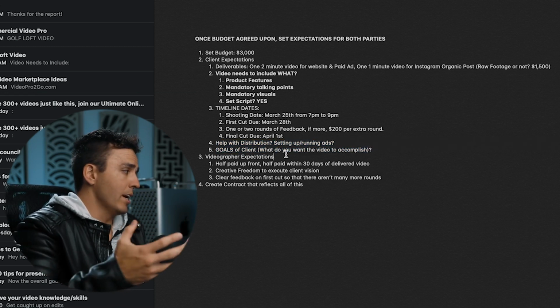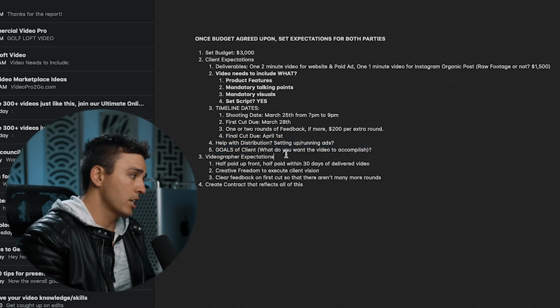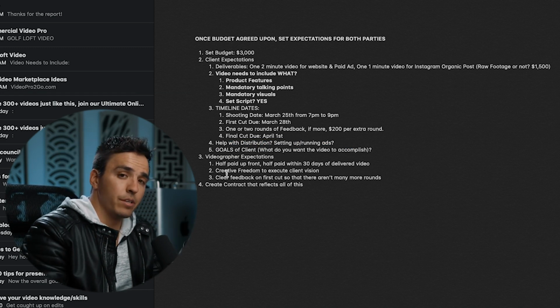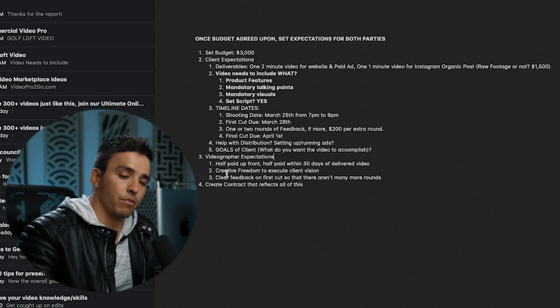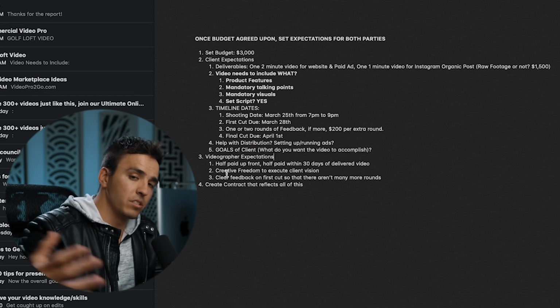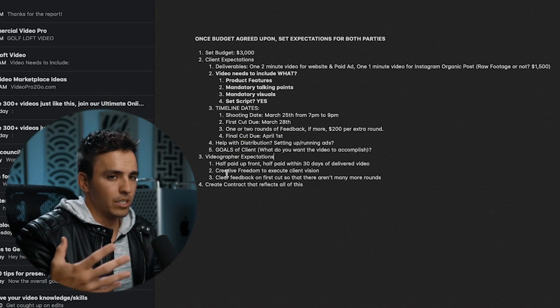So that's it for the client expectations. On the videographer expectation side, we need to discuss payment. I would recommend getting paid half up front and then half within 30 days of completion of the final project. You can decide how you want to get paid, but that's a pretty typical way to do it.